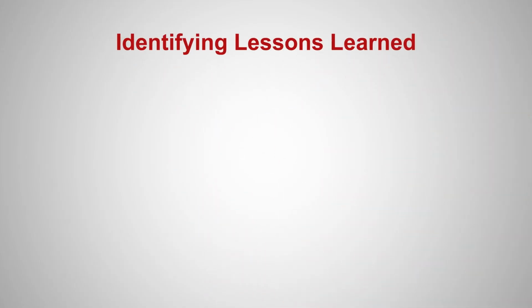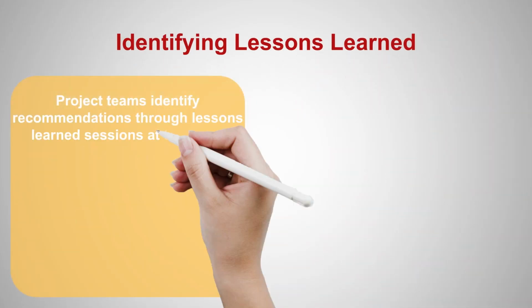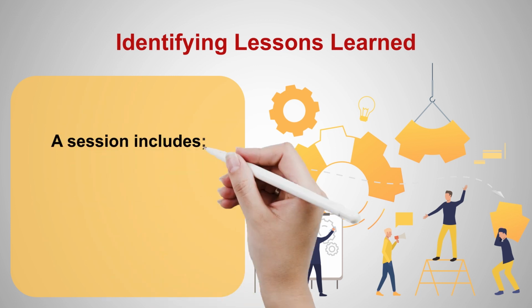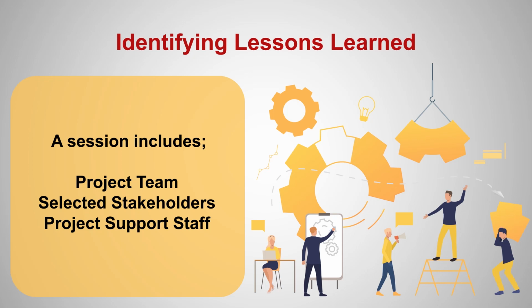Identifying lessons learned. Project teams identify recommendations through lessons learned sessions at this step. Preparing for the session and conducting the session are substages of the identifying step. Creating a project survey is important to prepare for the session. A session includes the project team, selected stakeholders, project support staff,